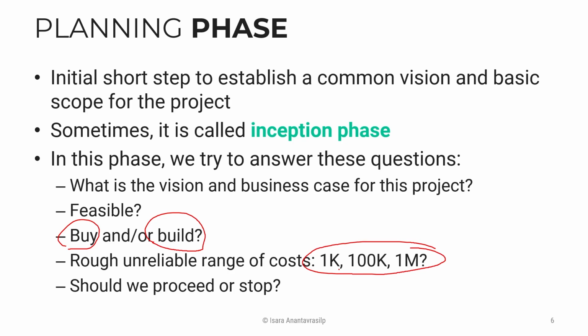So what we can do is ask an expert. You pay them a little bit, or maybe you can ask your friends who have experience in this: we have this set of requirements, how much do you think it is going to cost? They are going to compare with existing or previous projects they have done, and then give you some rough number. This is what I do all the time.